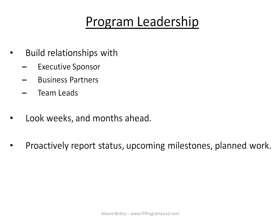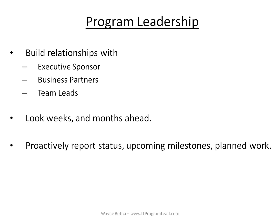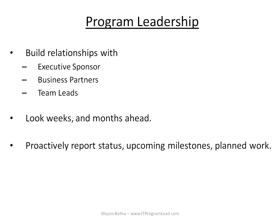Let's talk about program leadership. I think anyone can manage a project, but it takes experience, effort, and skill to lead a program. I have found that I get the best results when I make the time to build relationships with executive sponsors, business partners, and team leads. You need to look weeks and months ahead as the program leader. For example, I like to send out a concise weekly email that communicates the highlights of the plan for the coming week. You need to proactively report the status, upcoming milestones, and planned work to your executive leaders.